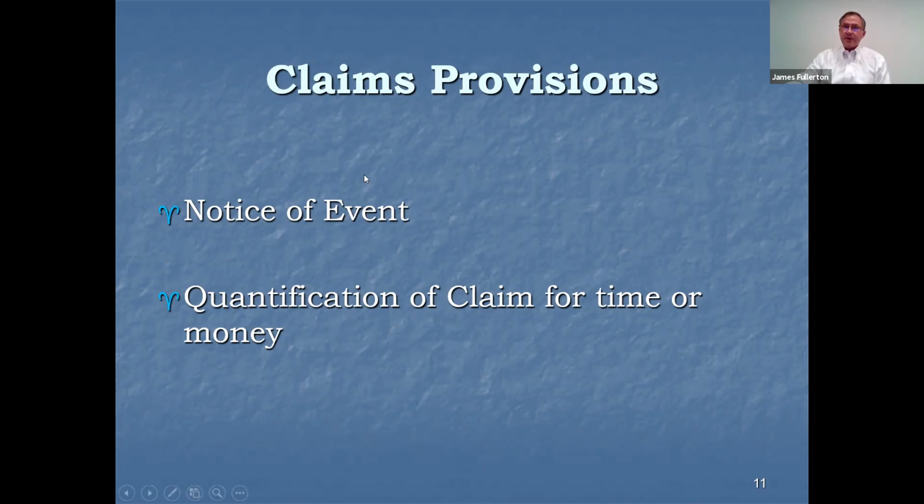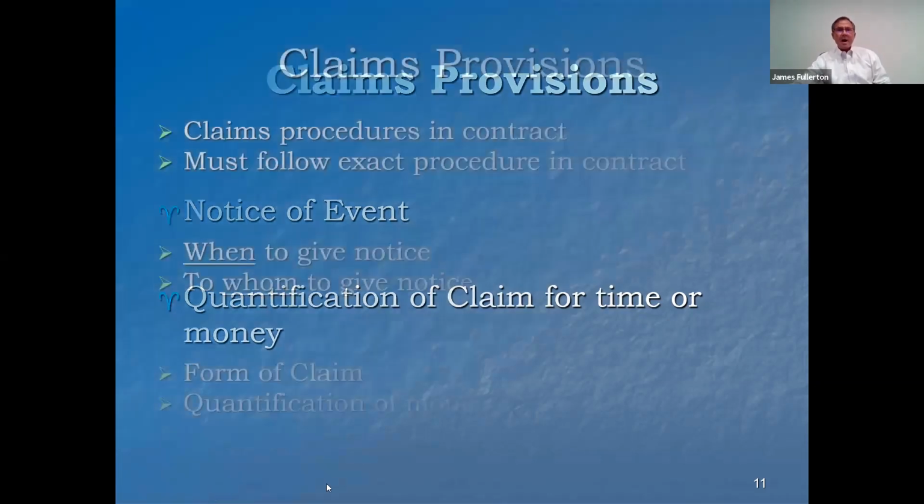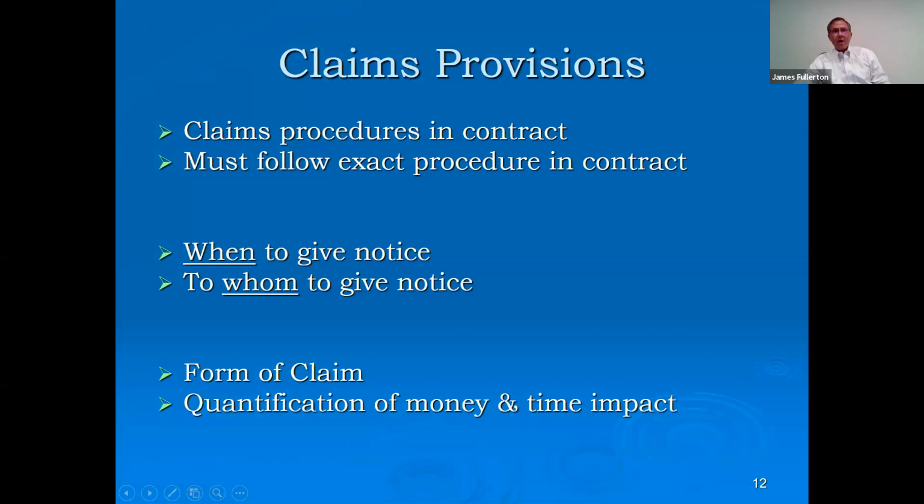A judge will cut you slack on giving a complete quantification of time and money. They will not cut you slack if you fail to give notice of the event. All right, so you must follow the exact procedure in the contract.